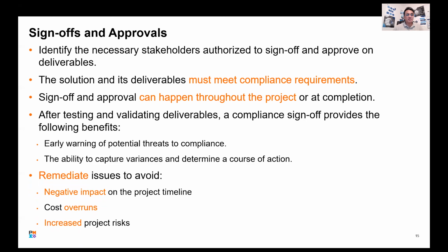If the vendor has delivered what's required, you can close it. So procurement sign-off can happen throughout the life cycle of the project as and when required. Similarly with the compliance sign-off. If the compliance was applicable to a certain aspect of the project deliverable and you have done that, you don't need to wait till the end of the project. But it can happen at the end of the project as well, depending on how you're approaching it.